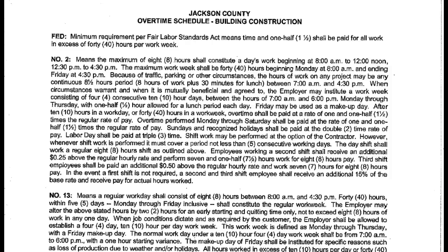Okay, so as soon as somebody's worked 40 hours during a regular work week, 1 week work period, any hours over that, you have to pay time and a half for any other hours. And you know, a lot of people use games to try to get around this, but the fact is, once someone's done 40 hours, the 41st hour is time and a half, and that's the way it is.